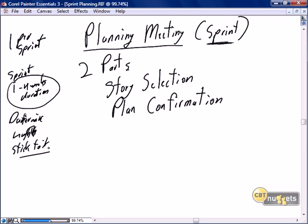If the team decides on a two-week sprint, stick to two weeks. Don't vary between one week, four weeks, and two weeks arbitrarily. You negotiate the length with the business owner and then stick to it until you have a totally valid reason to change — which would be identified through the sprint retrospective. We don't change the length of a sprint simply because we want to get something done quickly or add significant value.